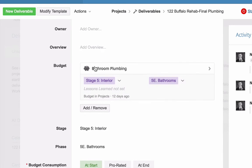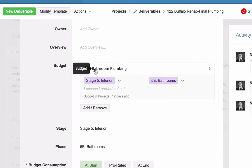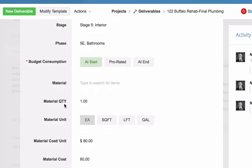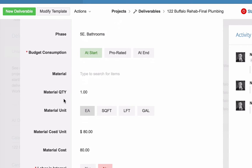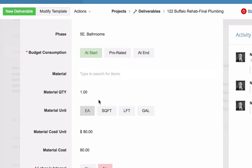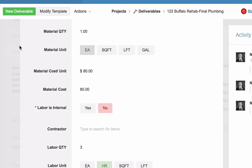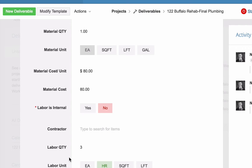Budgets are an awesome piece. I'm going to talk about that in a future video. We'll talk about that later. Budget consumption. Again, we'll talk about that later. This is where it starts getting cool and we start estimating costs. So, we're going to estimate, and we're going to talk about material quantity and labor quantity and other costs. So, the way we estimate rehabs, there's three main costs that go into every single deliverable. There's a material cost, there's the labor cost, and then there's another field for other costs. Some other thing that's maybe not easily captured with material or labor. Okay.